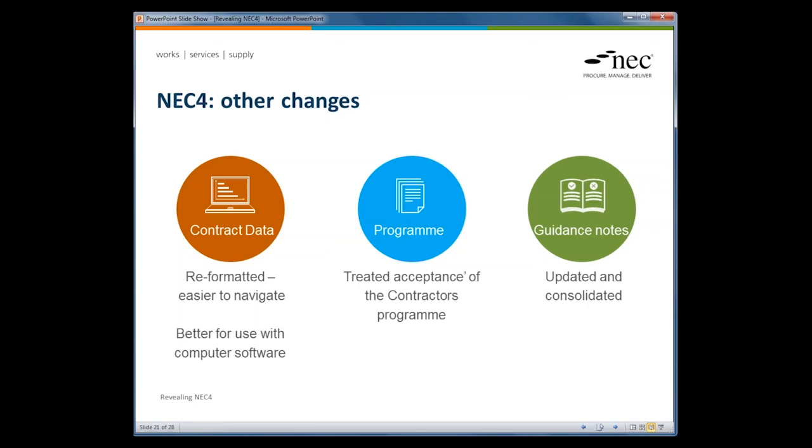The second volume takes on the requirement to create the contract documents and shows how to do that. That of course for each individual contract will be a little different. So there's a guidance note prepared for each of the contracts on how to prepare the contract. So that's contract data, how to write the scope, how to get yourself set up and get all the documentation correct. It's combining these how-to guides and existing guidance, and indeed expanding it with further guidance and examples as to how to put together the contract data.